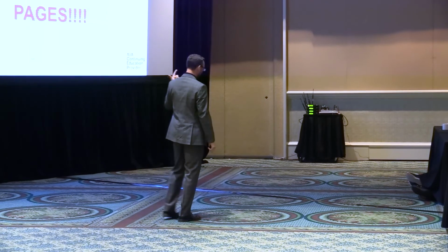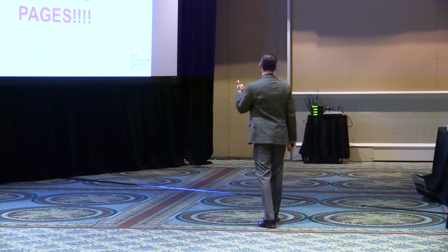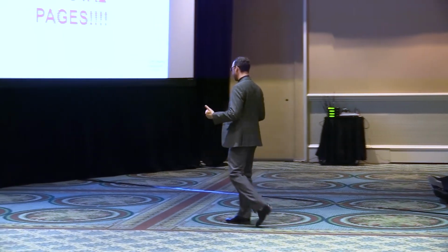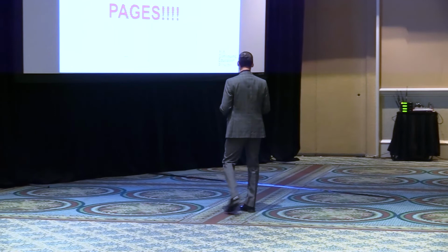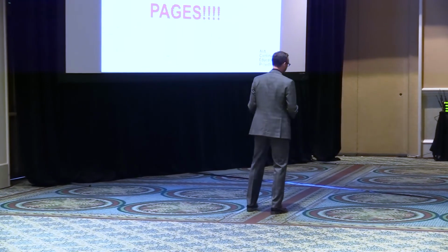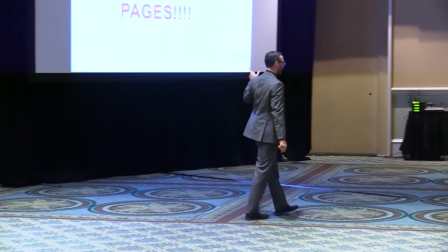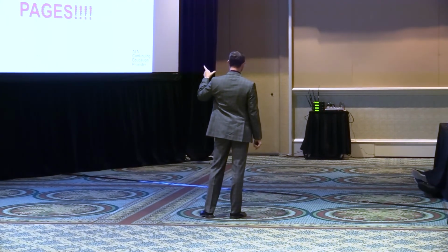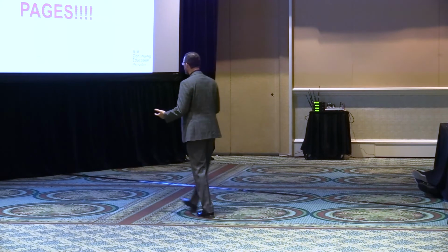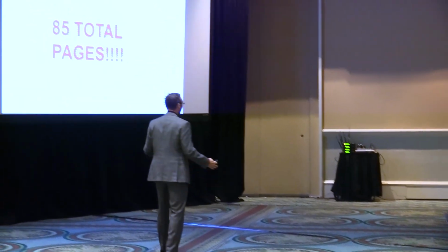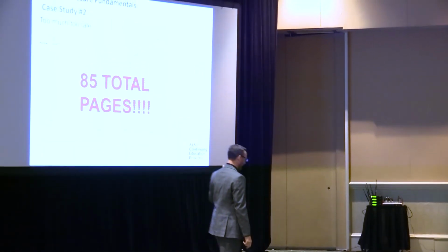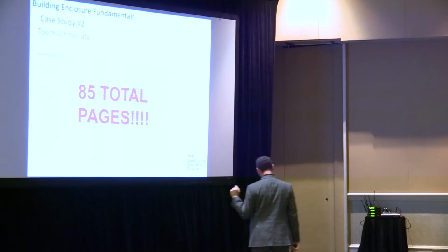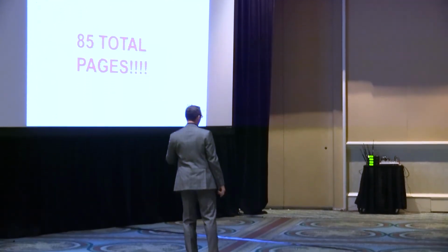And even if I did ultimately feel that I needed to do this, I think it's important to almost create a hierarchy of needs or a hierarchy of issues that need to be addressed, because we're never going to get 85 total pages of comments to be addressed in an addenda or a revision to the documents. That's not going to happen. There's no time left to do that. So I think, again, if we really focus on what's important here and highlight those things that are important, there's a much better value to the project.